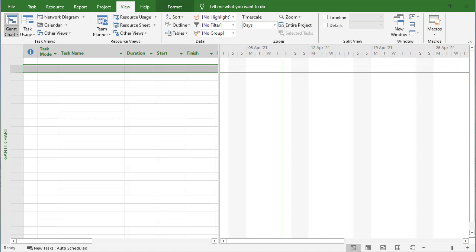It's all about a variable material resource that you can add into the schedule. Sometimes you've got a material resource like fuel or a concrete pump where the usage will depend on the amount of days or hours that you're going to use that particular resource.